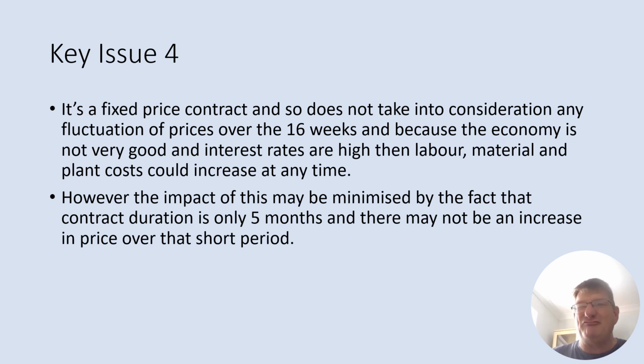So there may not be that many issues surrounding high costs. Labour, material and plant costs may not affect the project because it's such a short duration, 4 months, 16 weeks. In addition, you're not employing many subcontractors, you're employing direct labour. So again, their wages are going to remain very stable. So labour prices probably would remain very stable for you because you've got a lot of direct employees.